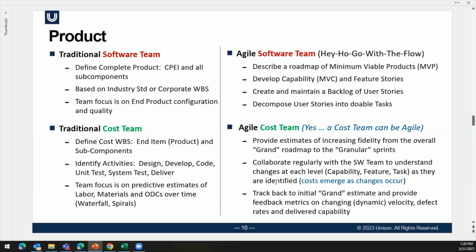So we're going to do, against that grand overall roadmap, one great and large software estimate. We have one delivery of one giant software product. Maybe there's an analogy to something else. Maybe we know rough order of magnitude type things, but we don't know a lot of the details. And this is particularly critical because for government, we're looking a couple of years ahead to put money in the budget. The budget being put together for 2 years from now is being estimated today.